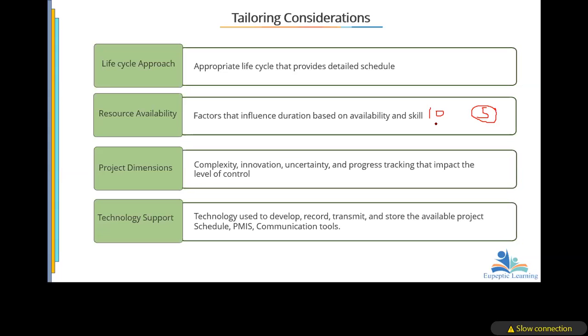So if I know that it is Sebastian that is going to work on the project, I can't say that developing this particular program will take 5 days. No, it will take 10 days because Sebastian is working on it. Now, in some cases, it was Sebastian that was working, but when it got to that particular activity, Henry is available. So if Henry comes to replace Sebastian, you should expect that the 10 days we gave the particular activity is no longer going to be 10 days.